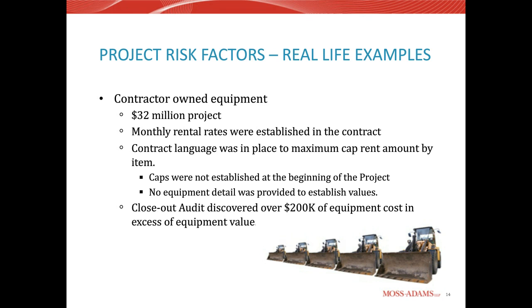It's a lot easier to agree to those with your general contractor at the beginning of the project than at the end trying to fight over what the value was, because most likely, like in this case, the owner had already paid the general contractor the $200,000 over what it should have, and then it had to go through negotiations trying to establish what the value is and what the cap is.